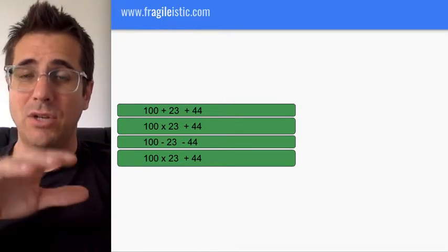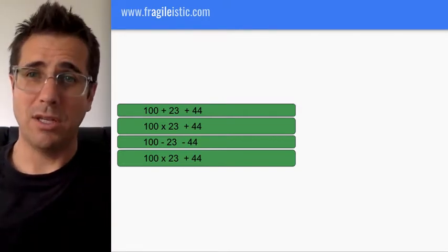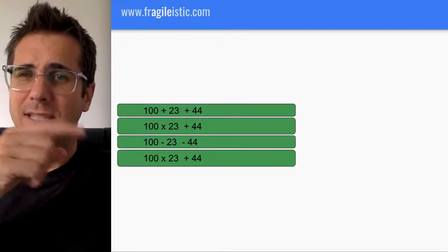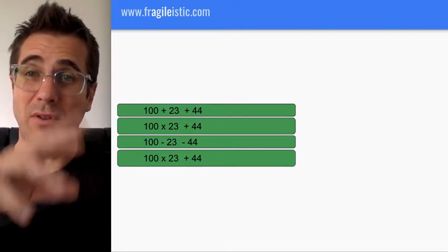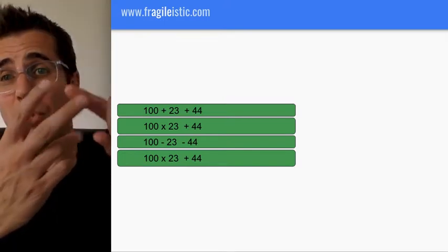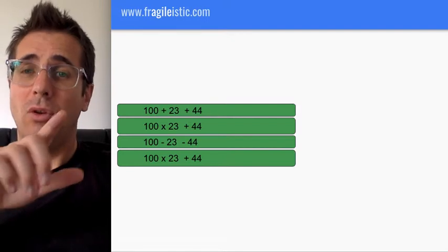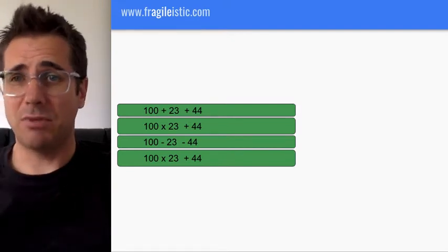The next thing we need to do is size those. We don't really want to be saying, well, we're going to do 2 things. We want to say, how big is that? Is it a 1 or 2 or 3 or 4? There's 2 different ways of doing it. Story points, which usually uses the Fibonacci system. So 1, 2, 3, 5, 8, 13. So that's one way. The other way is just say big, small, medium, large, t-shirt sizing.